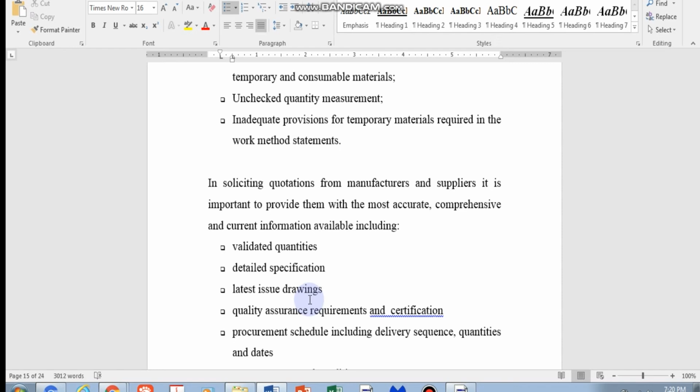So all these are actually part and parcel of costs that you need to look at, and the procurement systems that you're looking at, the delivery schedule, the dates of payment. It will make a lot of difference in terms of cost management, in terms of the rate that you're going to put down. So if the billing cycle is longer, you may consider a lower rate for that particular work that is to be done, you see.